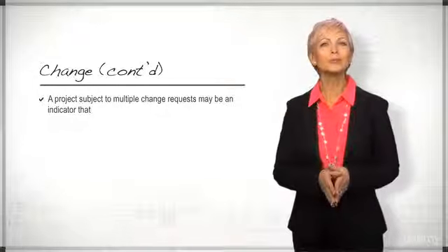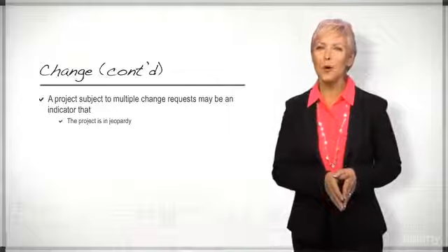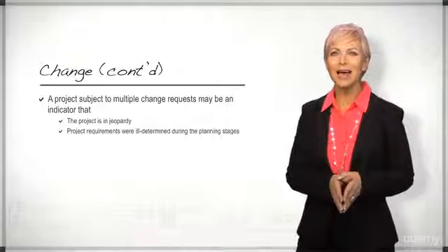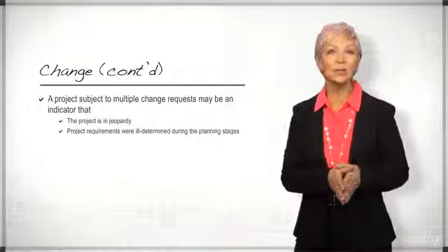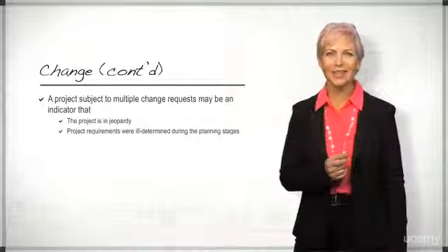If the answer is no, then the processes to perform integrated change control should be initiated to properly engage formal change management activities. A good project management practice is to keep changes to a minimum. A project that is subject to multiple change requests may be an indicator that the project is in jeopardy or the project manager and team did not do an effective job in determining project requirements within the planning stages of the project. Let's take a look at an example.